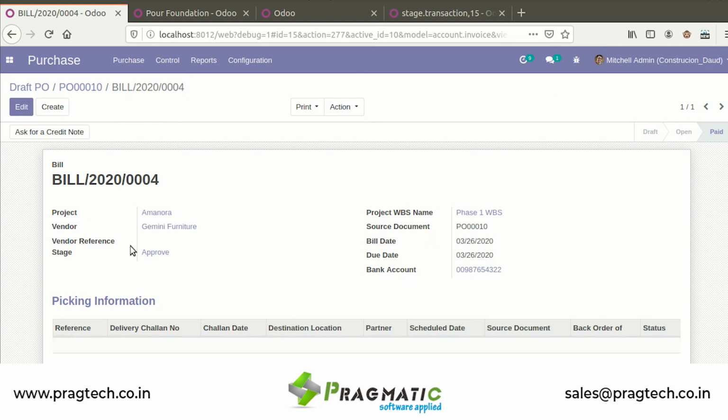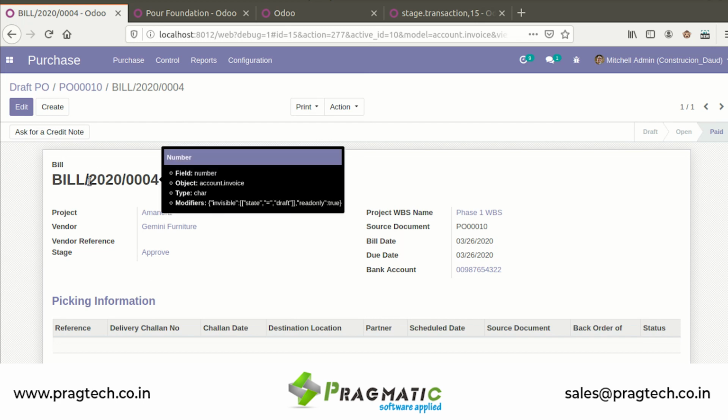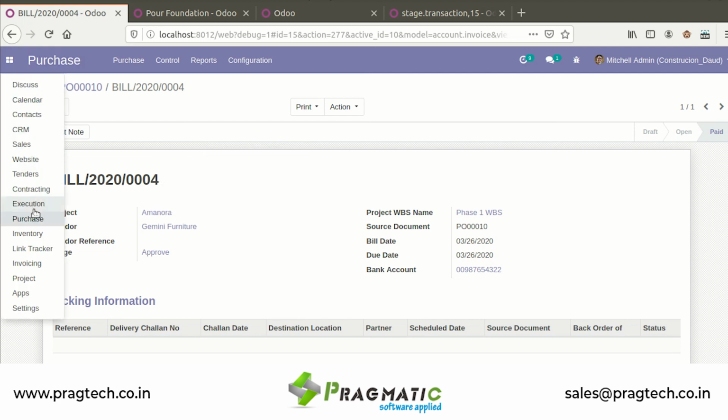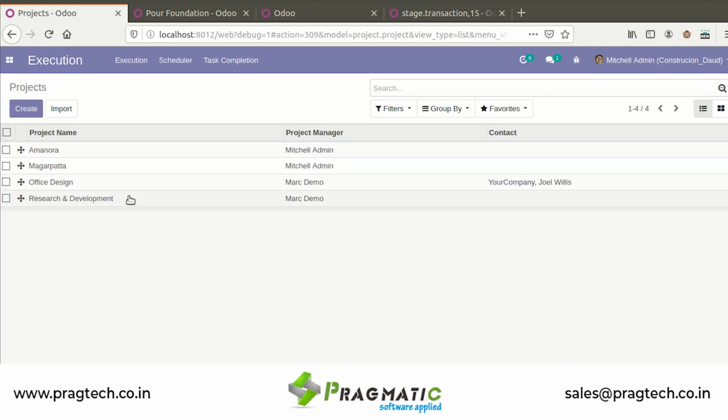As we have done for the purchase of raw materials, now we need to similarly create the order for labor. So as we have created a purchase order for material, similarly we will create the contract order for the labors. So for that, as we have created a task library, in that we have mentioned the labor quantity and which labor we are selecting for this particular construction work.